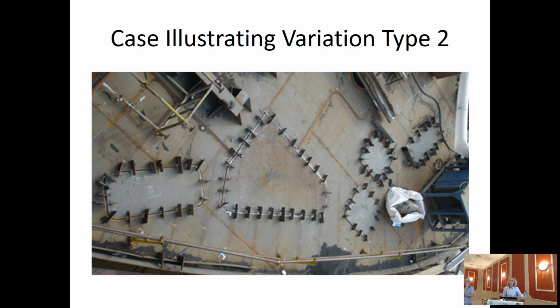One solution approach, also coming from the industry, is to deck the entire vessel with a thicker steel sheet to preserve the option to install different equipment than anticipated. Of course, this option has some initial extra costs, but it also preserves the flexibility to adapt to changes at least cost. So inside this solution we have two different flexibility strategies. One is postponement, to decide later what equipment to install on the vessel. The second one is hedging. Hedging means that we pay something, we buy something, to prepare for late changes with the least disturbance.